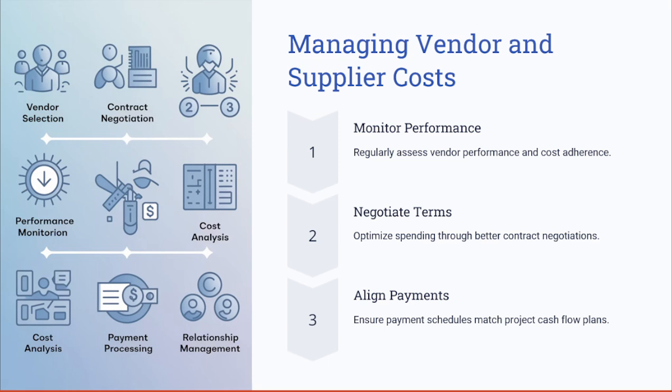You also have to have negotiation skills to negotiate better terms to optimize the spending. Ensure the payment schedules align with the cash flow plans. This is how you can manage the vendors' and suppliers' costs in a more effective way.